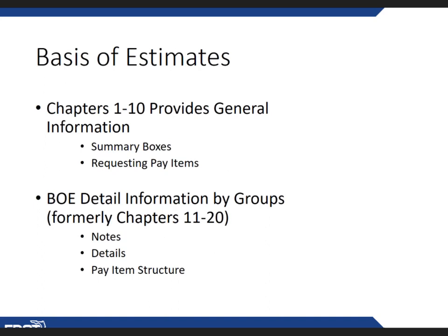So the first 3 digits of the pay item match the spec section. And it will soon match the design standards. Yes, the new design standards effective with the July lettings have been renumbered to correspond. So we are strongly working towards having the standards and the specifications complement each other more and reducing any duplication.